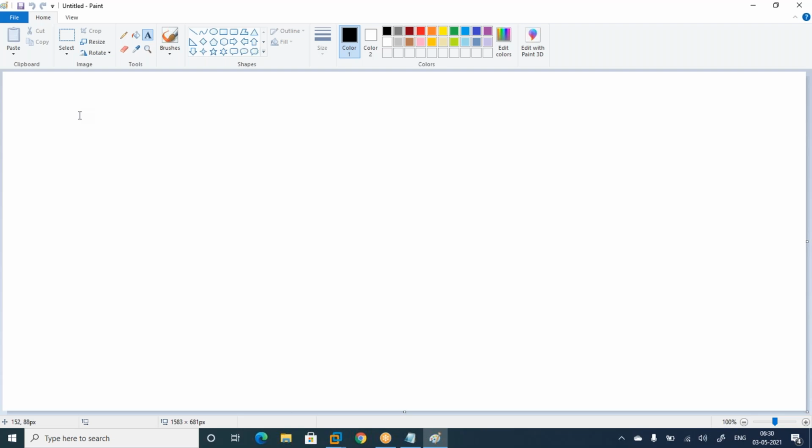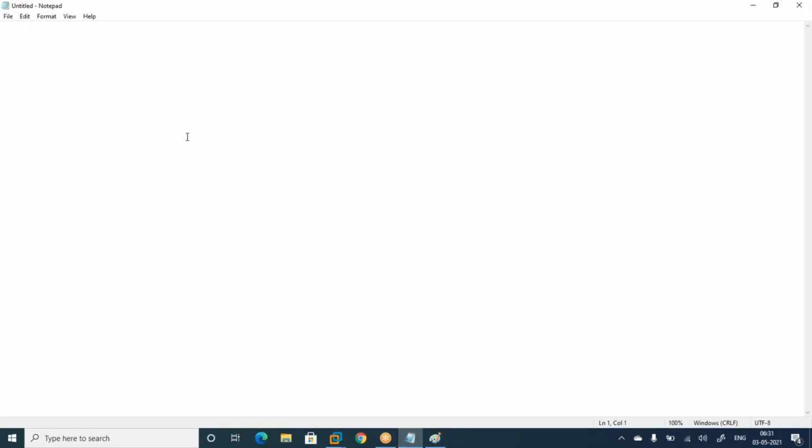Okay, once it is completed, then they will write the SOW. SOW means how long it will be, how many people should be there, everything will be frozen. So how many functional people, how many technical people, how many leads, who is the project manager from the client side, who is the project manager from the implementation side. In this, there are two streams always. One is the client side or business side, business people, and another one is Microsoft partner people.